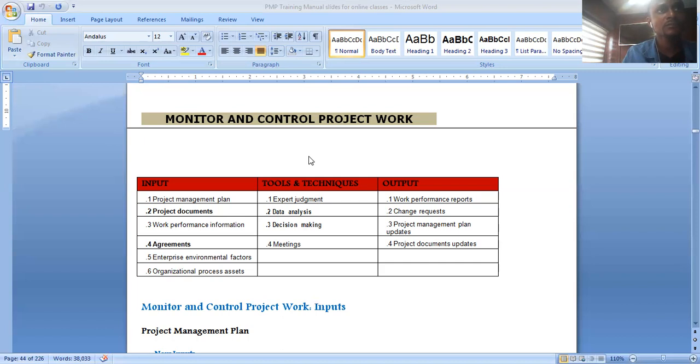If it affects the cost of the project beyond that 10%, that is why you're telling him to hold on. You're telling him to hold on. There is room for emergency. That's why we have the risk management plan. We have to identify all those things in the risk, things that can go wrong. And always remember that when you go to the field and start experiencing so much, it is your failure in the planning phase.